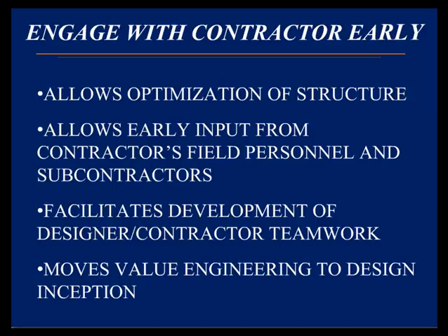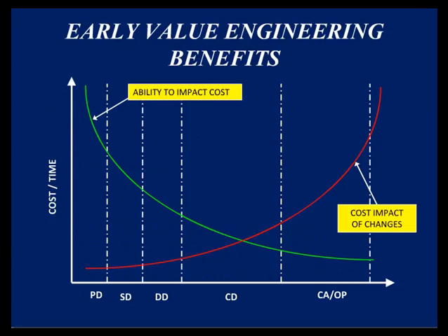The final thing on this slide, by engaging with the contractor early, you can move the value engineering process to the start of a project instead of the end, where more commonly it occurs. And the importance of that is illustrated here. The ability to impact the cost of any project, whether it be a building or otherwise, is greater during preliminary design and schematic design than it is during CDs and construction.